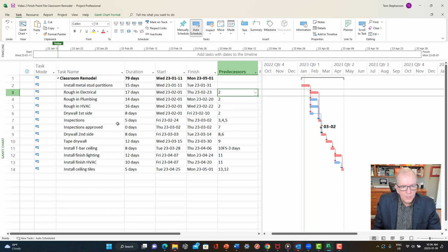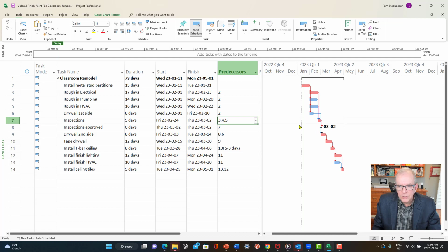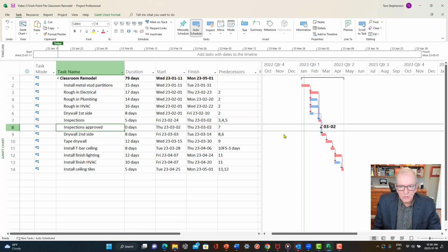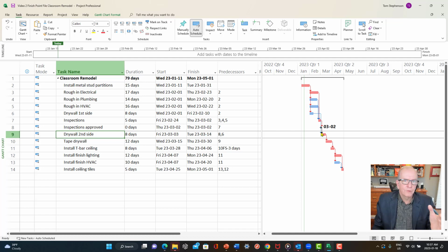And then they're kind of going into where inspections occur, or at least 3 of them are, and we've got inspections approved. Now that's a funny shape, that's a milestone, so that's a point in time, and I go into detail on that in the previous video, so if you want more on that, take a look in the description. Drywall second side, I've got drywall first side linking into that, as well as the inspections approved. I don't want to cover it in if I haven't got the inspections approved.